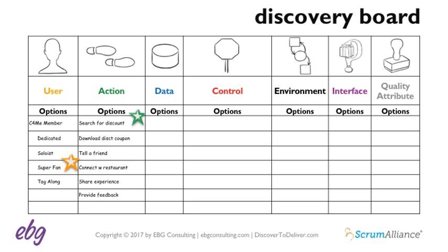We're going to slice out searching from downloading. And in practice, we're probably going to have for the next sprint a search story and a download, but we'll just focus on searching. And this would be further detailed with some conversation around the discrete actions like select a city, select the artist, choose the date, and so forth.